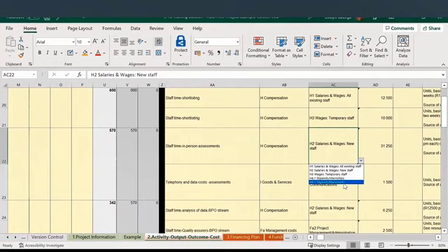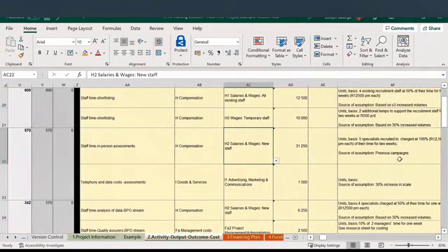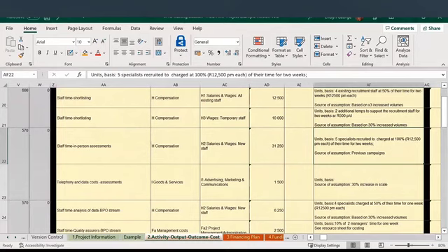We have stipends and we have placements. But for this particular activity, we're dealing with salaries for new staff. And here, in terms of the units, we said they're going to hire 5 specialists, charge them at 100% of their cost, and they're paid 12,500 per month, but this is only for 2 weeks, and this is based on previous campaigns.